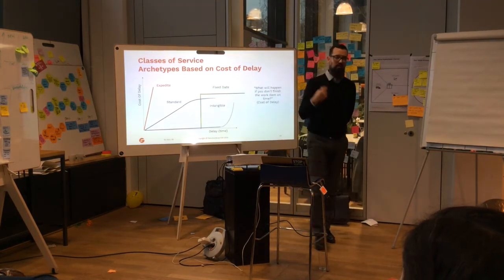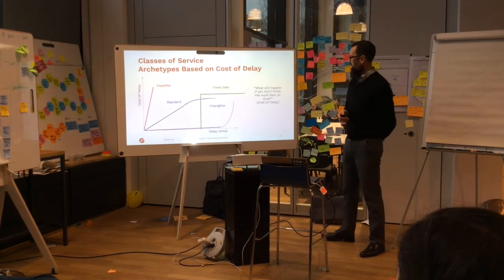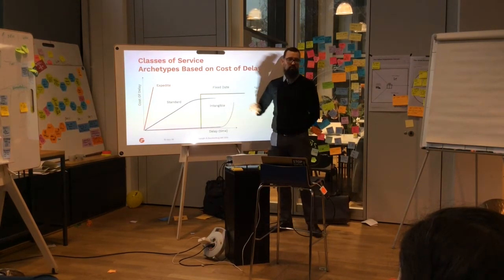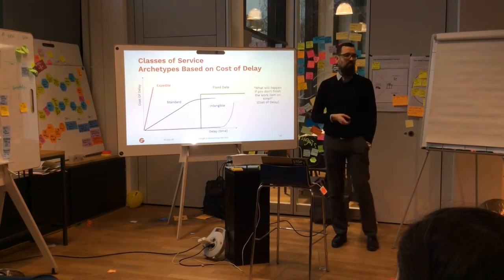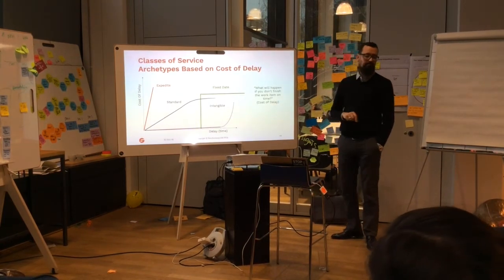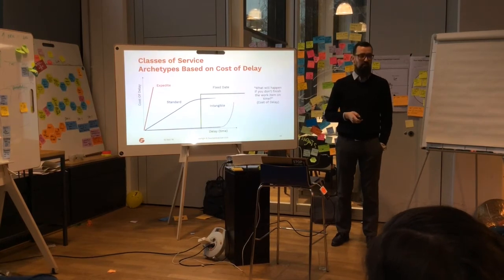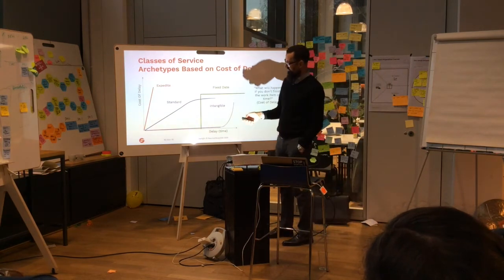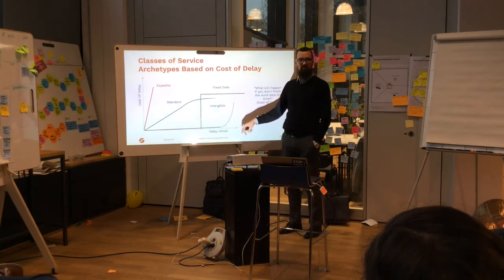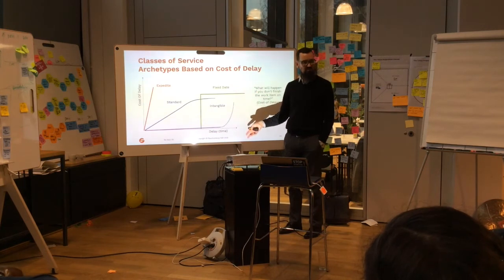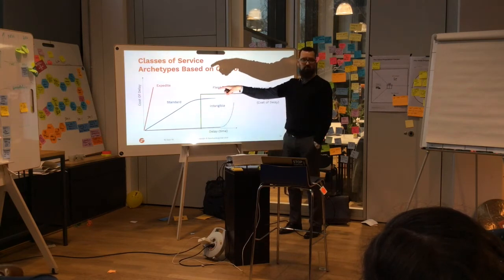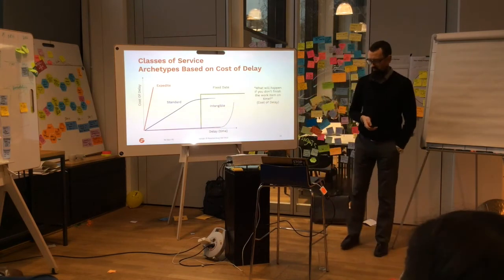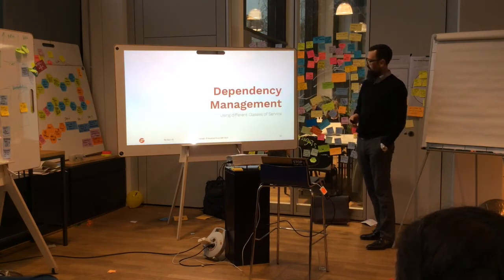These are the standard four archetypes based on cost of delay. We have Standard - that would be nice if you already had it, but we don't. Then Fixed Date - a great example is GDPR, legal changes, or an Oracle database update. Then Expedite - I call them 'burning guinea pigs' - your database is down, you can't access something, really high risk events. And my favorites are the Intangible class - refactoring and doing important but not urgent work. The problem with those items is they become more and more urgent, and then become expedite. They hunt you down eventually if you don't pay attention.